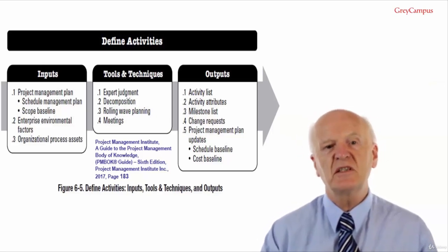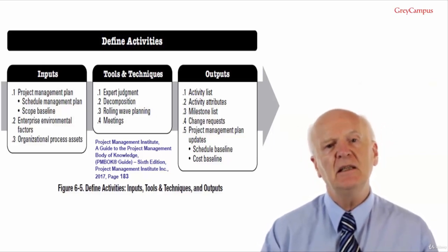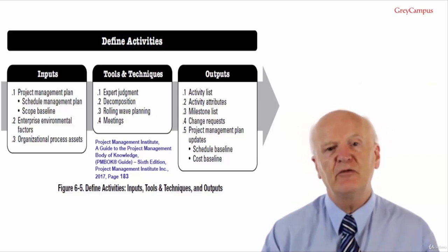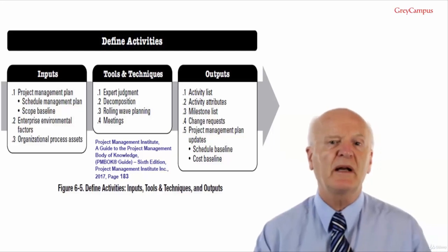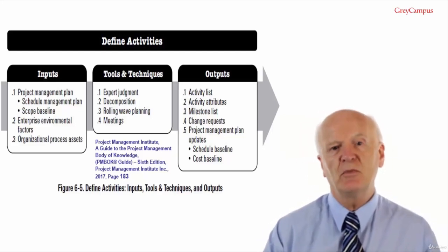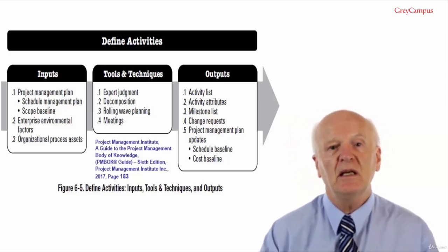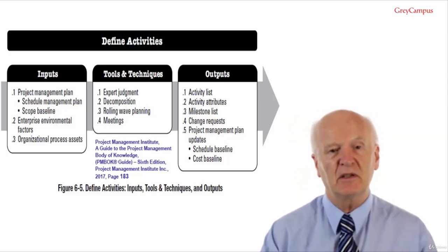Therefore, work can exist at various levels of detail depending on where you are within the project lifecycle. During early strategic planning, when information is less defined, work packages may be decomposed to a known level of detail. As more is known about the upcoming events in the near future, work packages can be decomposed into activities.